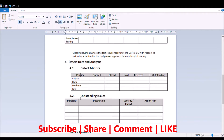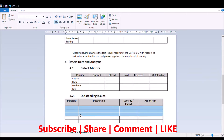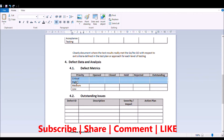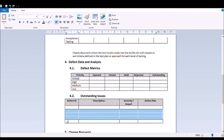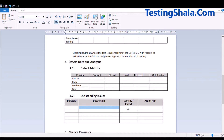That would help the stakeholders to decide whether to make a go or no-go call. We should also clearly detail the outstanding issues, especially the critical and high defects, which stakeholders will be very interested in. For those, we should clearly call out the defect ID, the defect description, severity, and the action plan for fixing each issue.